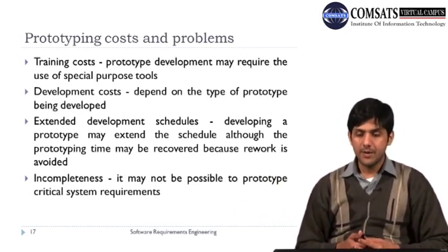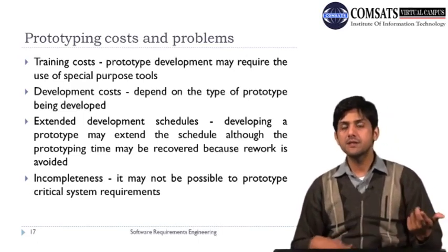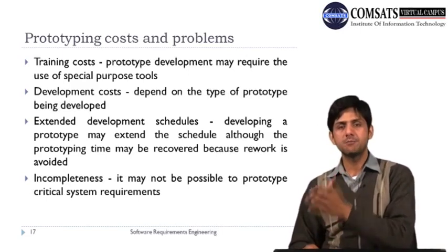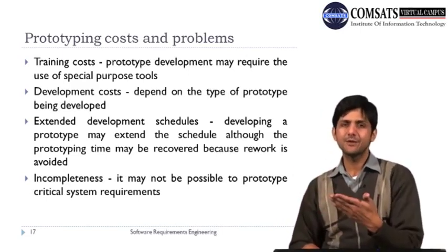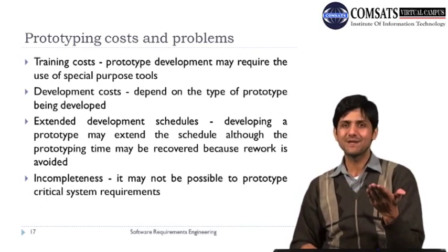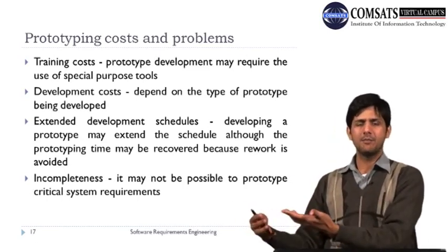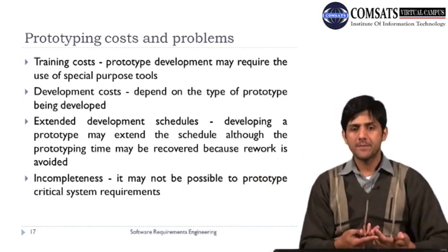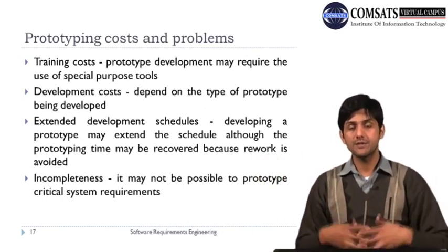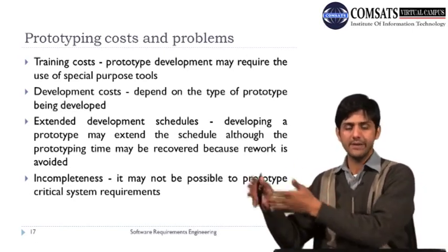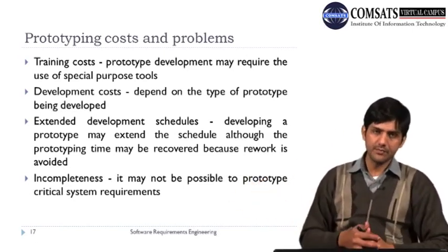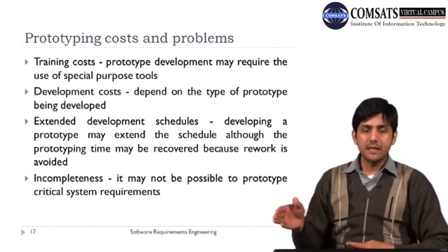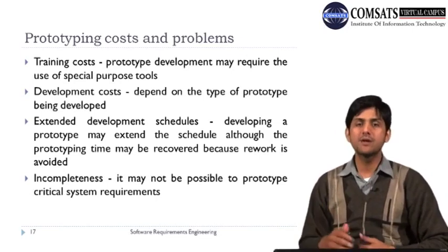then there are development costs, depending on the type of prototype being developed. Now let's imagine that you are developing a throwaway prototype. Then all the time that your developer spent on developing it, if you think in one way, it's wasted because you are throwing it away in the end. But it's not all wasted, because you used it to elicit requirements and develop a clear understanding of the requirements, which is going to be helpful towards the timely and effective completion of the project. Then there are extended development schedules. Developing a prototype may extend the schedule, although the prototyping time may be recovered because rework is avoided.